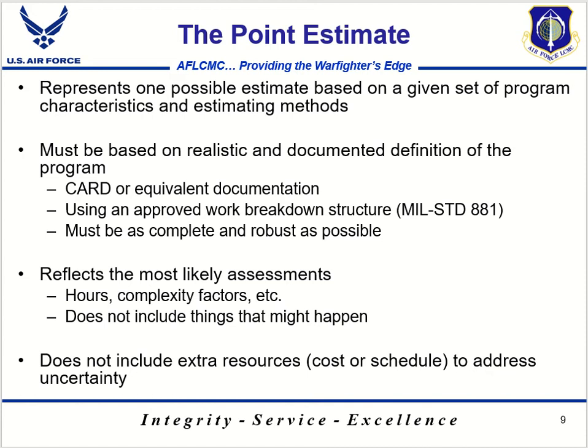You need to be on the lookout for any type of embedded risk or additional resources that are consciously or subconsciously added to the estimate to deal with some kind of perceived risk within the program. You don't want any of that in the point estimate.